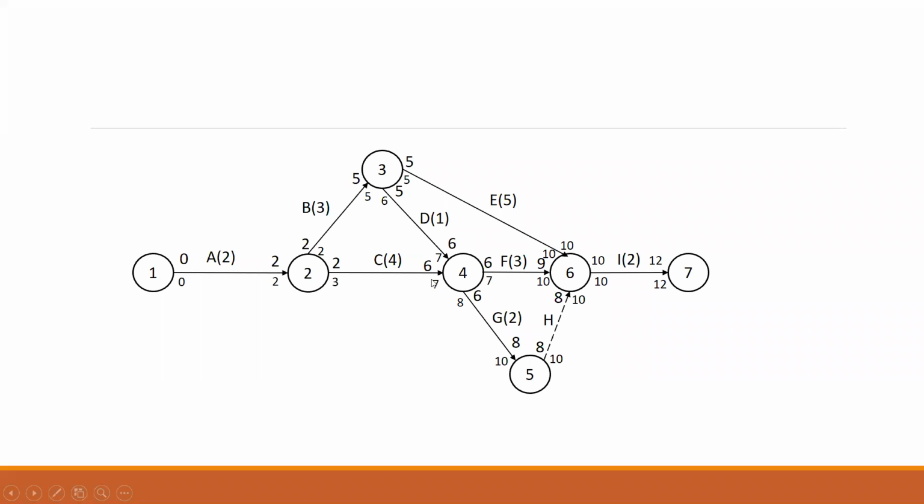So here we come and put 7 here. Similarly, we put 7 here. Whereas when we solve this, 7 minus 1 gives you 6. 7 minus 4 gives you 3. Okay. Now look at this node number 3. We have 5 here and we have 6 here. Least is 5. So we put the latest finish time for 2, 3 as 5.